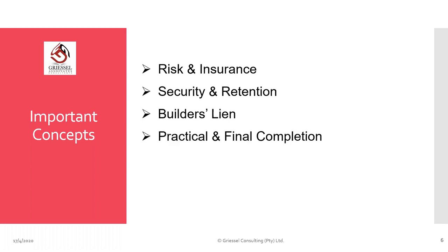I've quickly referred to practical and final completion when we were talking about the small works contract. I just want to reiterate that practical completion in general means that stage of completion where the work is fit for the purposes it was installed or built, and that the works can be used for the purposes intended. And final completion is when all the snags are completed.